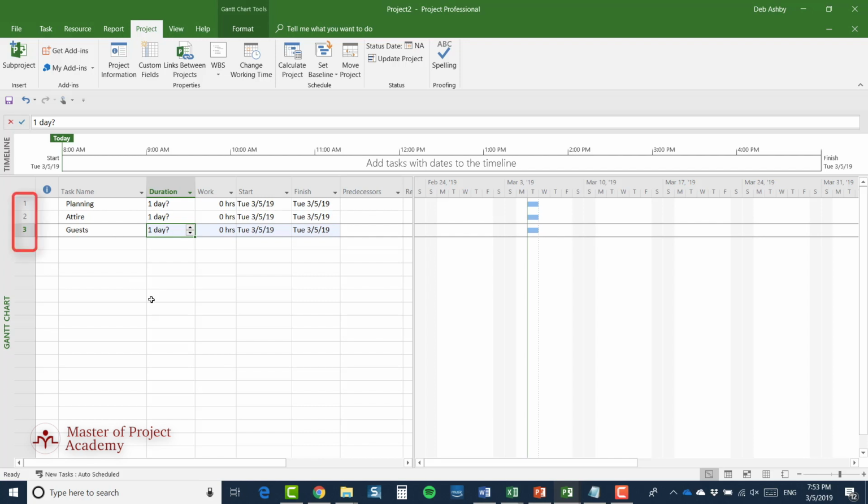Now in the left-hand column here, you have something called a task ID. And as you'll see later on in the course, task IDs fulfill a very important purpose. But one way of looking at this is that generally speaking, the convention is that the tasks with the lower IDs correspond to the tasks that are performed earliest in the project.